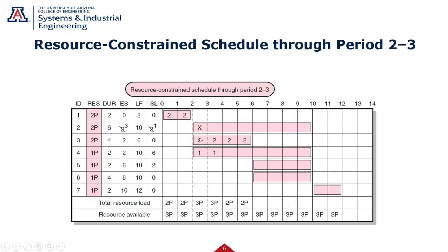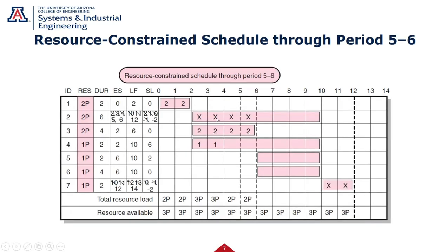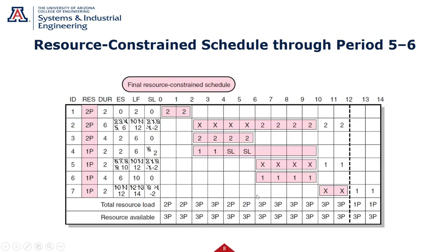So let's go look. I'm pushing it here. I'm cutting my slack down. Okay, but I've now got myself to 3 heads. Pushed it out even more, and I have to now get negative slack because I had to keep pushing it because it was 2 and 2. That got me to 4. I couldn't do it. So I had to push it out, but now I'm down to 3 heads and 2. Now I can add that task.